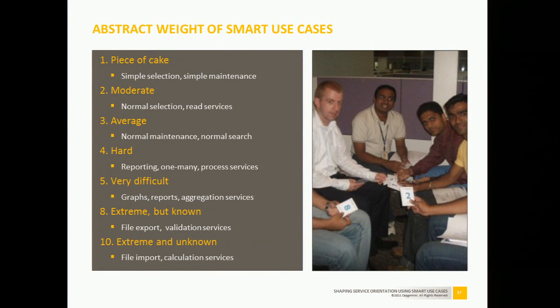So it makes up a good metric for comparing projects one to another. So this one has 1,400 points. Oh, this one has 1,600 points. So they might be comparable. They might be of the same size. And that's very good. So this is the scale, and it goes up from really simple ones.